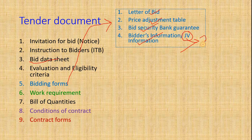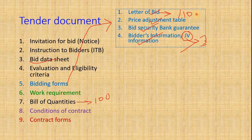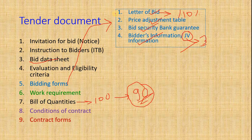The Letter of Bid contains the format where bidders declare how much percentage discount they will offer on the BOQ price. For example, if the BOQ price is 100 and they offer a 10% below-BOQ discount in the Letter of Bid, then the actual contract price would be 90. The Letter of Bid also contains other conditions, such as a declaration that they have not been declared ineligible by any government offices, and what the bidding amount is.